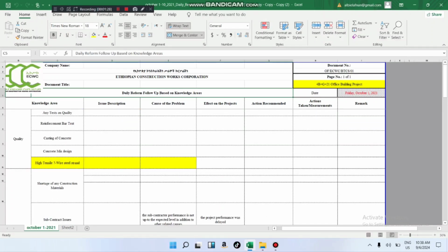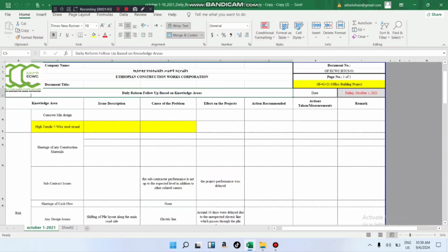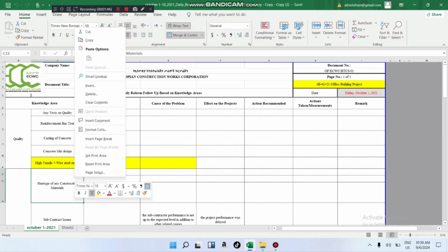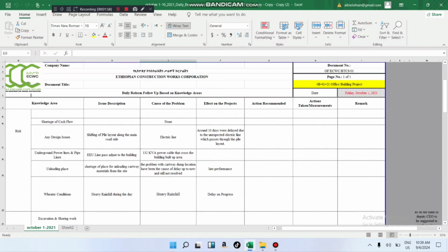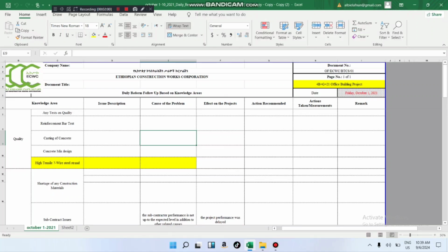the contract maximum is 60 days or 90 days. The maximum is 90 days. You have to finish the work depending on the work actually executed. The contract would be timed 60 or 90 days. If you have any problem that caused a delay after the commencement date, the starting date of the execution on the site, they will start counting, and you have to finish the project in time.